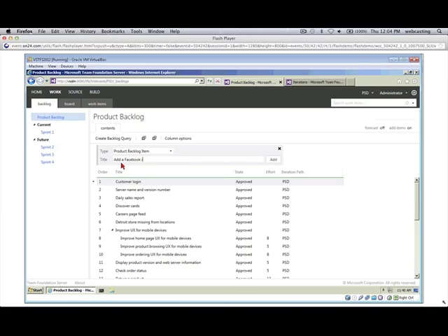control. And the high-level items I can add to the product backlog are bugs or product backlog items. Because really in Scrum, there's no such thing as a bug. There are just items in the backlog that may be bugs. So the fact that TFS differentiates it as a separate work item type is because the bug tracks expected behavior, the actual steps to reproduce it, things that aren't in the PBI. But I've seen teams not even use the bug work item. They'll just have PBIs, which are of type bug.